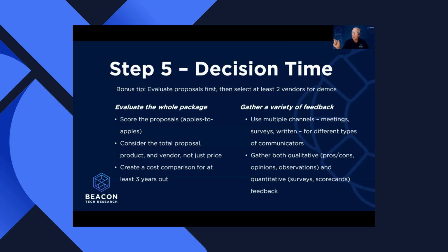So the first year is going to be the most expensive because you're paying both of those fees. Years 2 and 3, you're only going to pay the annual, whether it's licensing, support, what have you, but chart those out in a table so you can see what the true costs are combined over, and amortized over, say, a 3 or 5 year period, to see how much they really add up on the cost side. And if the implementation cost is too high, it's possible you can ask some of these vendors if they could possibly stretch that out over the first 2 years.